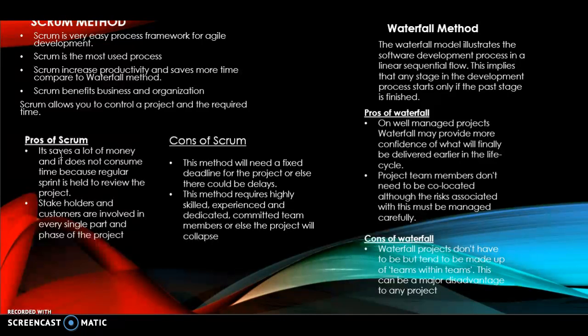Another disadvantage is poorly defined tasks can lead to inaccuracies. Project costs and timelines won't be accurate if tasks are not well defined. If the initial goals are unclear, planning becomes difficult and sprints can take more time than originally estimated.